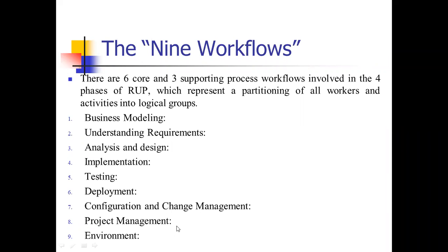The project manager will initiate the project, develop the iteration plan, develop the quality assurance plan, monitor the project status and schedule, assign the work based on specialty, report the status, and handle the exceptions and problems. Then the next active worker in this phase is the project reviewer. What will the project reviewer do? Approve the review, then planning review, then iteration plan review.